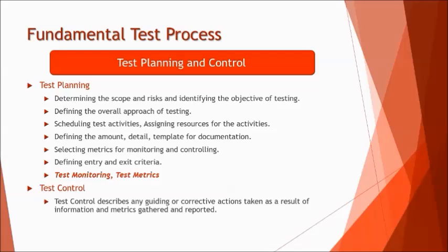On the other side, when the code is released from the development team for testing, my testing team must be available with all the test cases well prepared by that point of time. So as a part of test planning, the test manager also takes the responsibility of aligning the testing activities with the development life cycle.